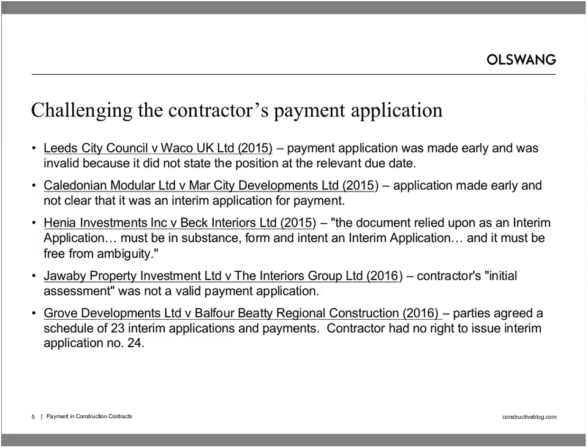And also raised some concerns that the application itself wasn't clearly a payment application related to the relevant payment cycle. And in those circumstances, it hadn't been made in time, and it also wasn't clear that it was intended to be an application for payment, and therefore it wasn't a valid payment application.